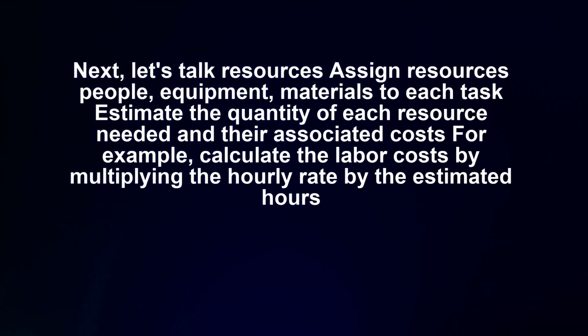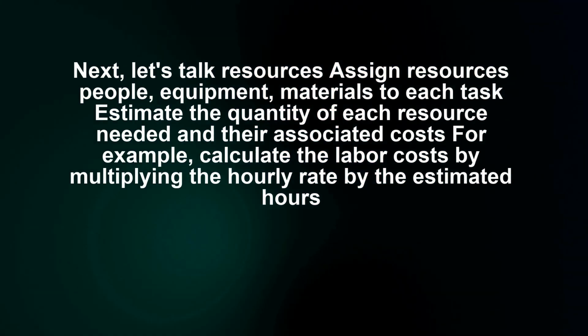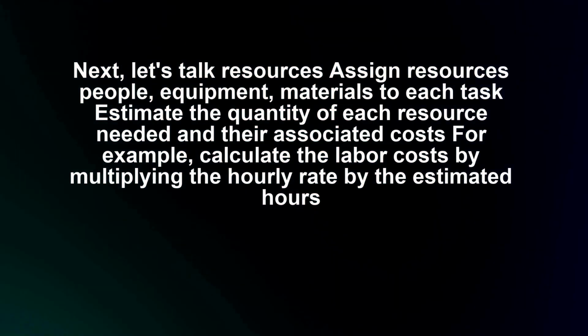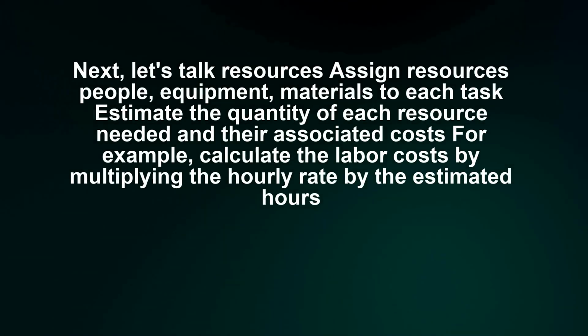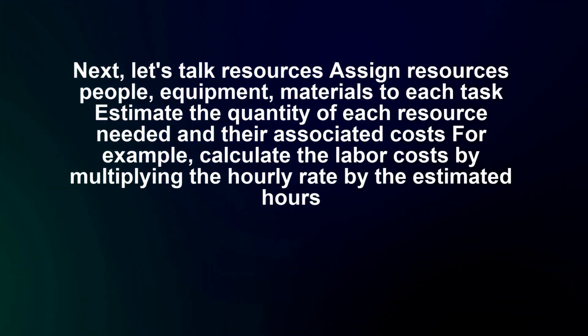Next, let's talk resources. Assign resources, people, equipment, materials to each task. Estimate the quantity of each resource needed and their associated costs. For example, calculate the labor costs by multiplying the hourly rate by the estimated hours.